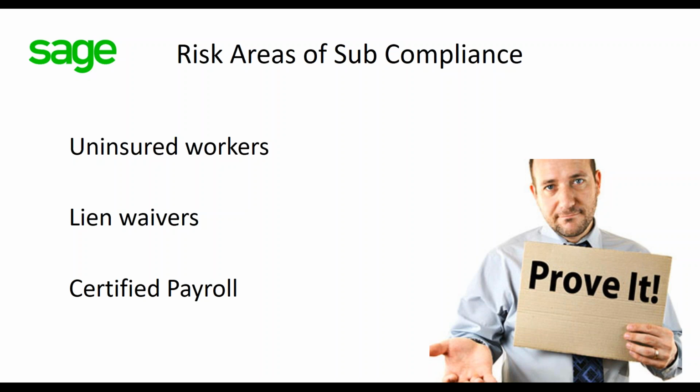Certified payroll. Government, as we know, government public works projects require the weekly certified payroll reports for all workers, including subs, including 1099s on the job. But the big deal is the U.S. Department of Labor requires that you pay prevailing wages, and you have to prove that you pay the prevailing wages. So I've recently looked up prevailing wages in my state, and it's a fairly easy way to look it up.